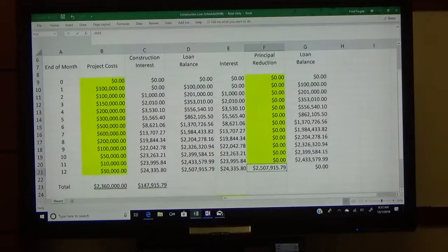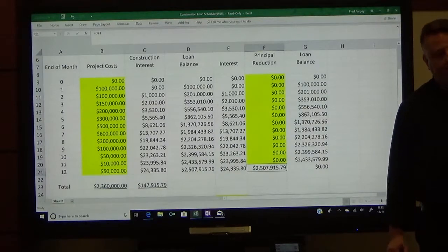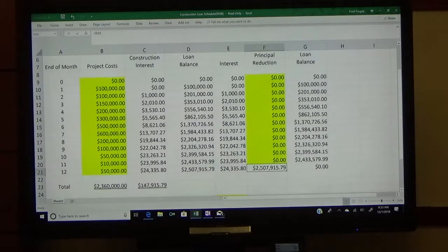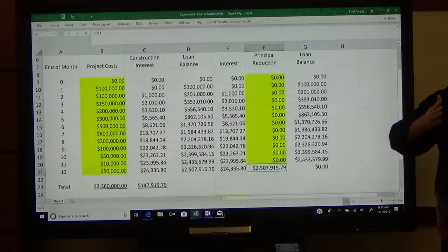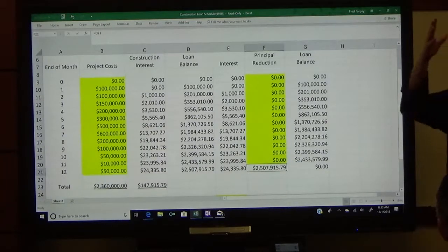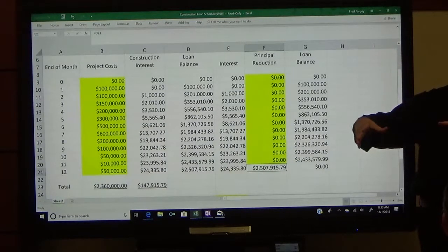So I noticed that you don't make any payments until month 12 with this? Yes, and it's quite common with construction loans. The idea behind it is, it's a line of credit, and we know, as a lender, that you don't really have any cash flow coming in off of this thing, because you don't have it finished, so you can't have it occupied. Now, let's say that it was a phased project, phase 1, phase 2, phase 3. You could finish phase 1, but still have the construction loan for all 3 phases, and you could start making some payments if that one gets occupied.